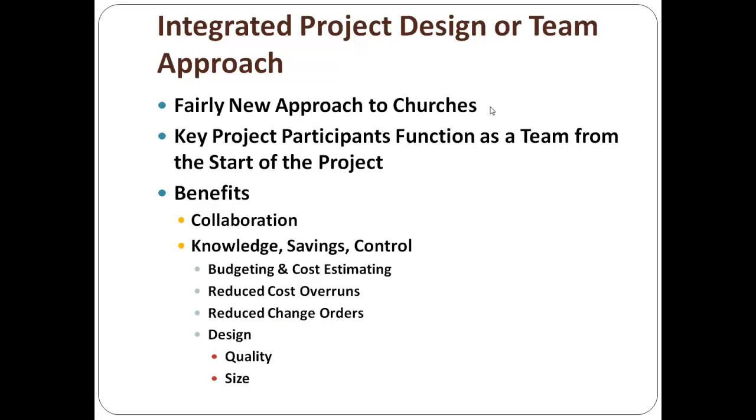If you do this, you're going to get the benefits of having everyone work together on the front end to keep the project on line in size, quality, and cost. To help the church get what it wants, consider bringing all the players. And all the players is more than the architect and the builder. It includes the engineers, the other designers, interior designer, landscape architects, audiovisual, lighting and acoustical engineers, and sometimes those guys are designers and fabricators in the same company. That's another discussion to come to.